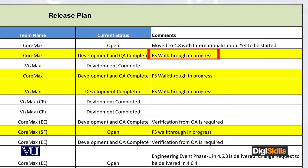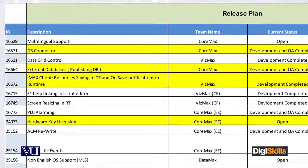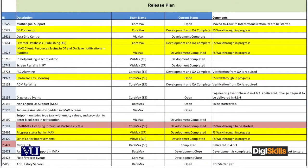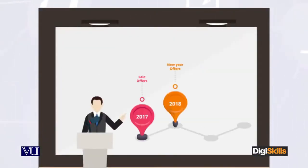This is how an actual roadmap or release plan is managed. If we go left, we have multiple features which are in yellow — these are the features which we have made part of a particular release. What is in white is not part of any release but is part of the roadmap. So the roadmap has a lot of features, and from that roadmap we make a release with a particular tangible deadline.